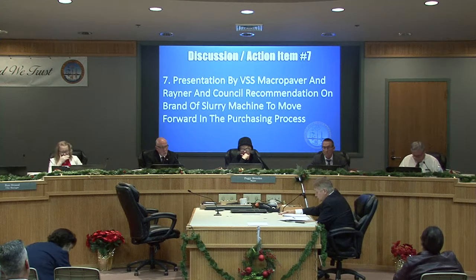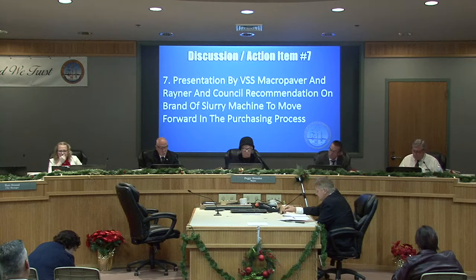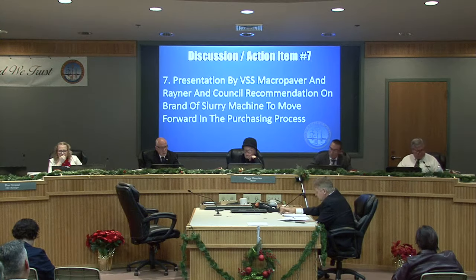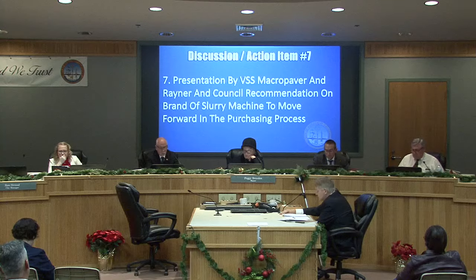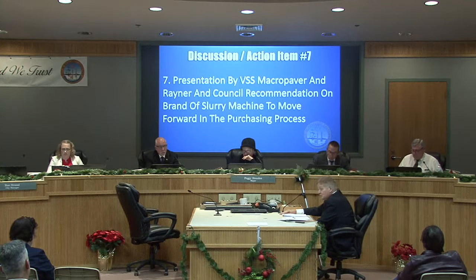Bids came in as follows for the cab-over Peterbilt, with both companies providing the exact same truck, both providing a loaner machine at no cost, and the machine would be delivered and picked up at our location at no cost. VSS Macro Paver bid $394,981.52. Rainer bid $395,216.74. The difference between these bids is $235.22, or approximately 0.06% difference. It's the closest bid I've seen in my 42 years in Public Works.